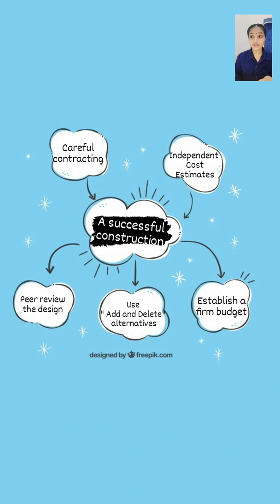Also, the contract with the designer can be written to require them to revise the plans at no cost if the bids exceed the budget by a stated percentage. Note that such a provision is difficult to negotiate with designers but can provide an important safeguard for the owners. Use add and delete alternatives.